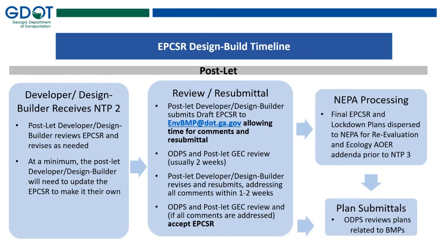So post-let for design build, as you all know, this handoff, the design continues after let, which means that the design builder will have an opportunity taking over at NTP2 to incorporate any necessary updates to the existing EPCSR based on lockdown plans. The updated EPCSR will be part of the ecology addendum and the NEPA reeval prior to NTP3 being issued.